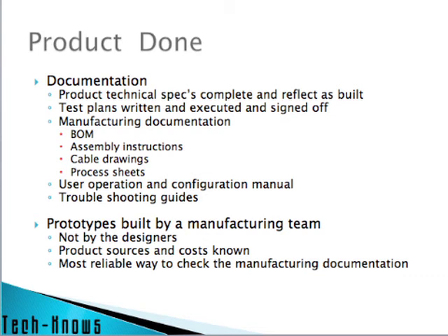Now if you're rushing to get your new product out the door, you're really rushing to get something in the customer's hands. And so one of the things you will often do is you will be shipping product before you have a complete manufacturing package, or you will be tempted to do that. And you would have your prototypes built by your R&D team. And I would recommend that after the first couple, where you're just trying to get the basic product functionality to work, that you pass that production off to other people. It is the only way I've found to really debug your manufacturing documentation and get you to done and ready to ship.